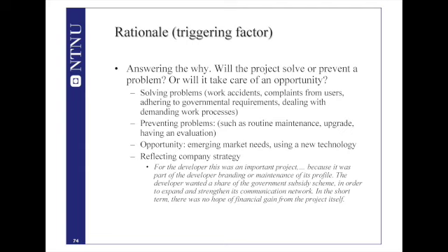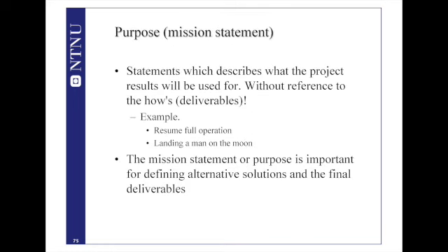It's an important step in any project to understand the rationale, and to agree on this particular rationale, because it will define one way or another your scope of work. The second issue that must be resolved is what we call the purpose or the mission statement. This is a qualitative statement, usually not quantitative. It's a qualitative statement saying what the project results will be used for.